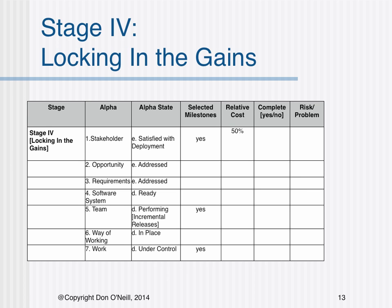Stage 4 entails obtaining stakeholder satisfaction with deployment. The opportunity has been addressed and the software system is ready. In addition, the team has performed incremental releases, the way of working is in place, and the work is under control. The critical selected milestones revolve around stakeholder satisfaction, the team performing incremental releases, and work under control.